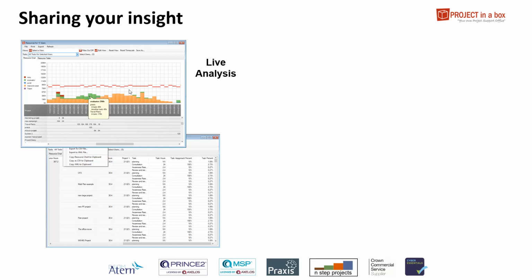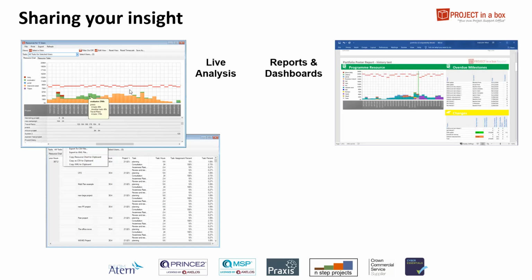The system won't auto level it for you. That's notoriously difficult to do unless you've got absolutely everybody, every project, every last little thing resourced. And most organisations, though they might think they do that, don't. And therefore levelling can cause all sorts of chaos. So you level the thing manually yourself with the insight that we've provided.